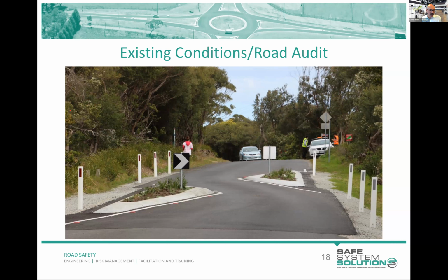What a much better way to do that is to use some different tools or methods to do a high-level filter of risk. Traffic volume and speed are a pretty good way to do it, and land use, as in if it's an urban land use, high speed, high volume, you pretty much know we're in high risk territory. And then you target and deploy some audits in these areas.